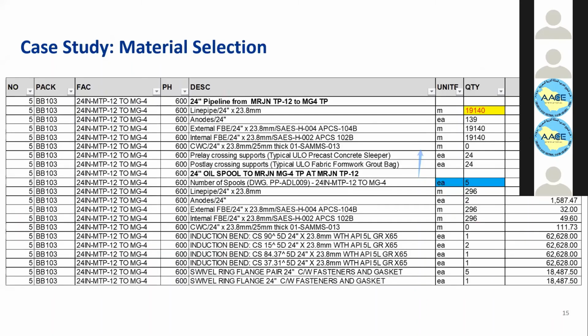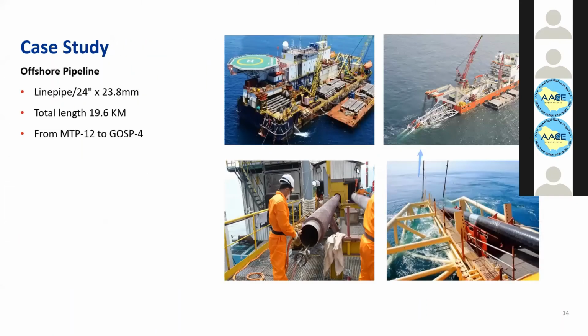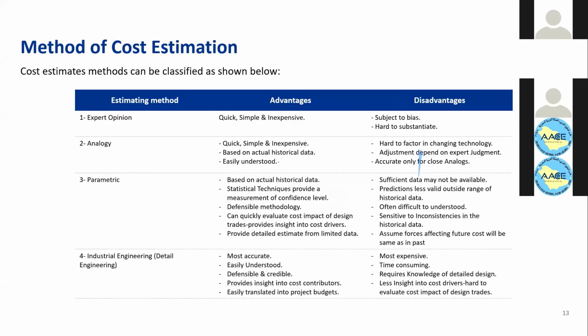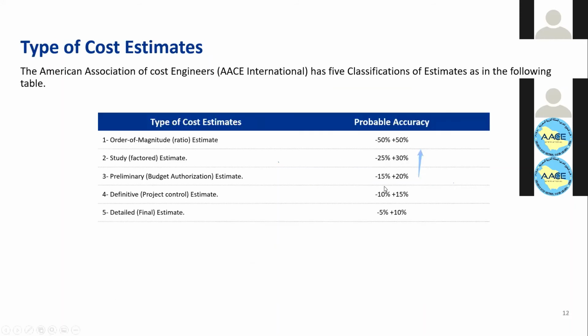Okay, yeah. For the accuracy, I rely on the AACE handbook, which I have from 20 years ago. But the accuracy usually depends on the type of estimate that we prepare, especially for Saudi Aramco, 3 types. The study estimate, which is plus minus 50, and what they call the DBSP estimate, which has an accuracy of plus minus 30%, and the ER estimate. The ER estimate for Aramco is plus minus 5%. But this one provided here on this slide, I rely on maybe an outdated handbook. I have it from AACE, but I'm glad to update those accuracy levels and share them with you.